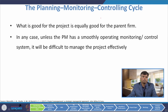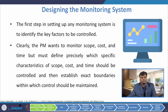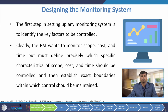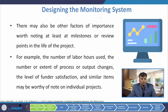Unless the project manager has a smoothly operating monitoring and control system, it will be difficult to manage the project effectively. The first step in setting up any monitoring system is to identify the key factors to be controlled. The project manager wants to monitor scope, cost and time, but must define precisely which specific characteristics of scope, cost and time should be controlled, and establish exact boundaries within which control should be maintained. There may be other factors worth noting at milestones or review points, such as number of labor hours used, extent of process or output changes, and level of funder satisfaction.